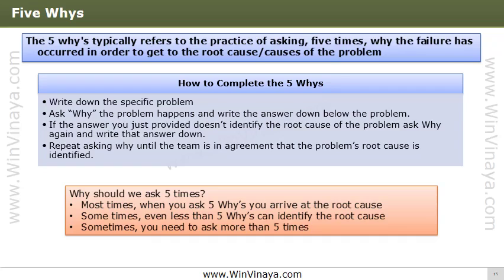The steps involved in five whys are: write down the specific problem; ask why the problem happened and write down the answer; if that answer does not identify the root cause, ask why again and write the answer down; repeat asking why until the team agrees the root cause has been identified. Five iterations of asking why is generally sufficient to get to the root cause.